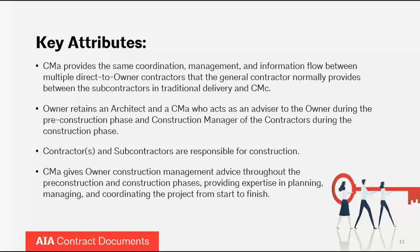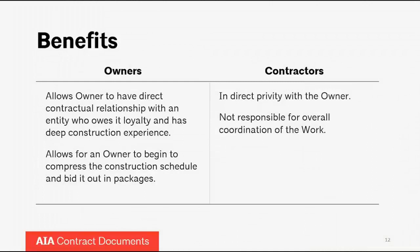The owner is going to retain the architect and the CMA almost simultaneously. The CMA acts as an advisor to the owner during the pre-construction phase and manages the construction of the contractors during the construction phase. The contractors and subcontractors, however, are the parties that are actually responsible for the construction work. The CMA gives the owner construction management advice throughout the entire project, providing the expertise developed in planning, managing, and coordinating all aspects of the project from start to finish.